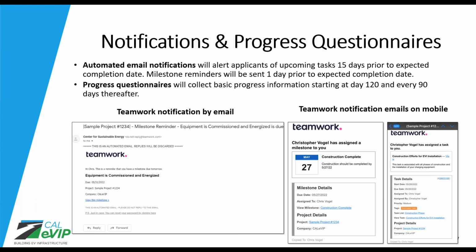Additionally, we are going to send out very basic progress questionnaires from Teamwork starting at day 120 of your project, so 120 days from the day funds are reserved, and we'll periodically follow up with a brief questionnaire every 90 days thereafter.